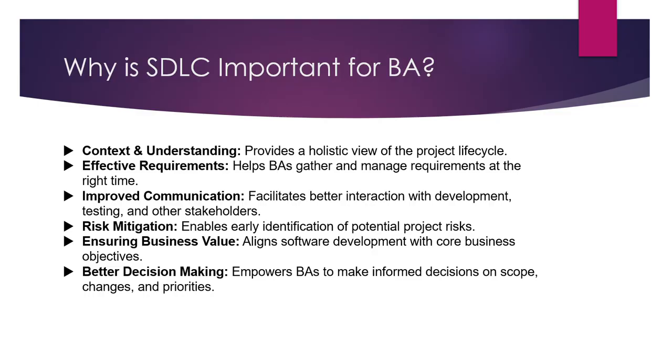Then effective requirement management. It helps the BA gather and manage the requirements at the right time. Whether we use the waterfall methodology or the agile methodology, we have a certain duration for requirement gathering, requirement analysis, design, test case writing, testing, UAT testing, and production deployment. That gives us sufficient time and an effective idea of when the requirement gathering milestone will be completed, when the design milestone, the testing milestone, and the end user manual milestone will be completed. So that's an effective requirement management technique.